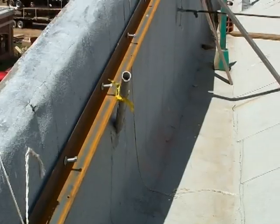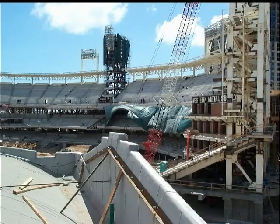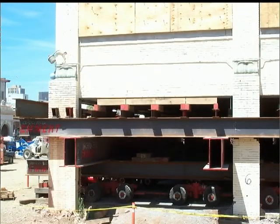At this time, the parapet bracing was installed on the roof. Crews installed a lateral brace along the entire parapet and then installed pieces to tie the brace to the roof. The support system was pressurized, and adjustments to the cribbing and shims were made to ensure that full contact existed between the support structure and the building. After the system was pressurized, the Emmert crew went through each room in the building looking for any indication that a high or low spot existed between the support structure and the building.